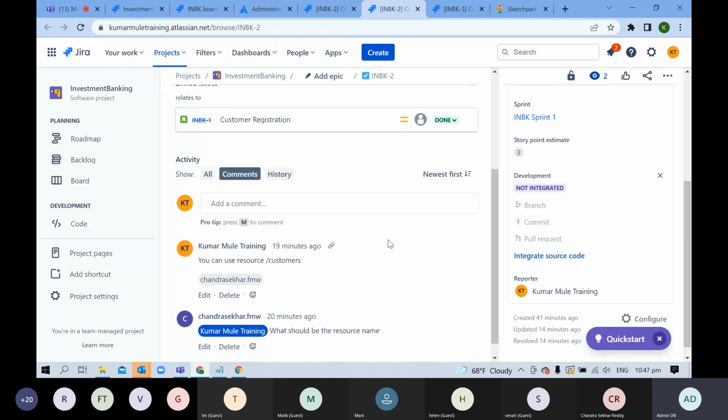Sometimes it happens that I push them, okay, do it on Saturday if it is very urgent, like something is going to move to production, like we have production go-live next week, and the testing team really needs one week of time to test a particular scenario. Then I push my team.